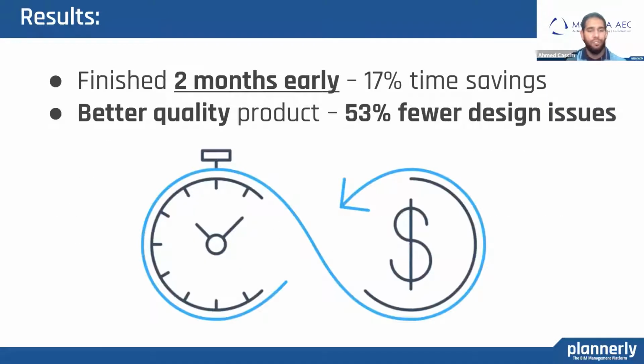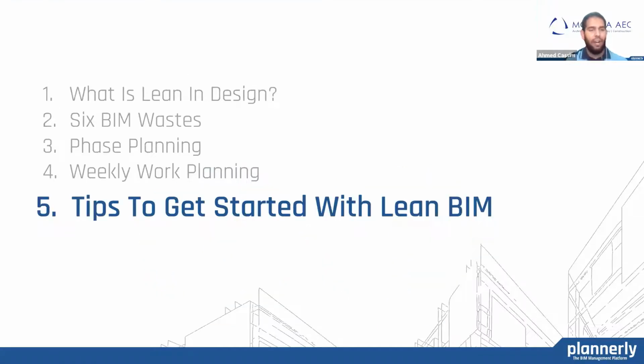So the project was done 2 months earlier than expected. So there is 17% time saving and 53% fewer issues. So we can see the benefits. And now let's look at some tips to get us started.